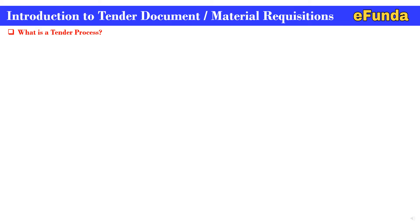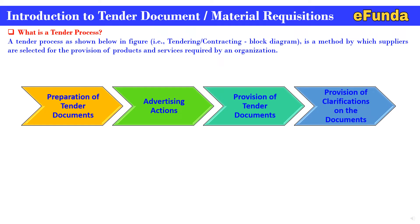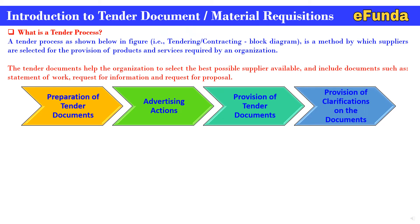What is a tender process? A tender process, as shown in the tendering and contracting block diagram, is a method by which suppliers are selected for the provision of products and services required by an organization. A tender document helps the organization select the best possible supplier available and includes documents such as statement of work, request for information, and request for proposal. Preparation of a tender document, advertising, provision of a tender document, and provision of clarification on the document are the key parts of the tendering process.